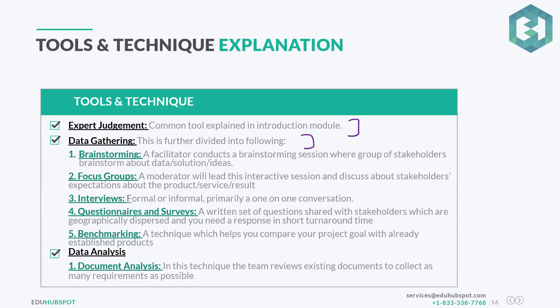For data gathering, we have brainstorming, focus group, interviews, questionnaires and surveys, and benchmarking. In brainstorming, a facilitator conducts a session where a group of stakeholders brainstorm about data, solutions, or ideas — you generate ideas and talk about solutions together.